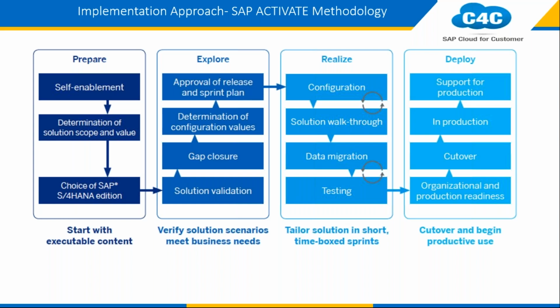Now in a prepare phase, as in the prepare phase of any methodology, you need to have a scope understanding and a process understanding. You need to study all those AZs. You need to find a gap in the prepare phase, and you need to find a pain area of a client. So all these activities are done in a prepare phase, and system requirements are also taken care of in a prepare phase. That is, whenever you receive a system, how the system setup is to be and what the integration mode would be, everything needs to be planned in a prepare phase only.